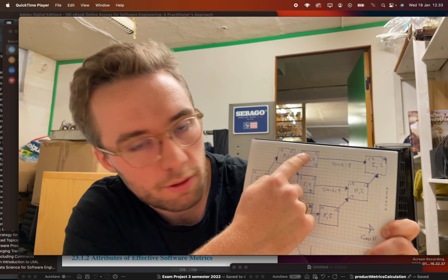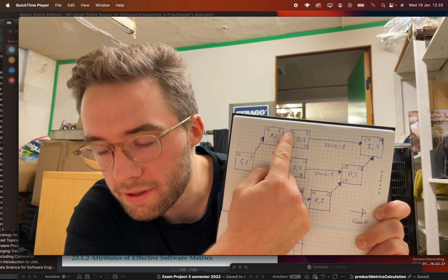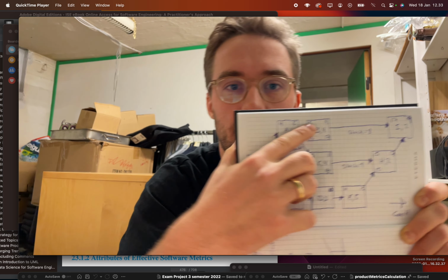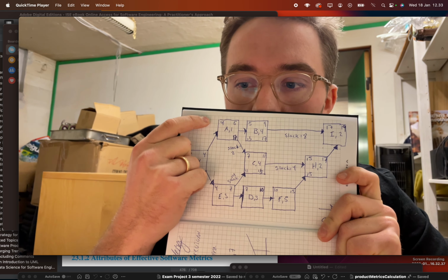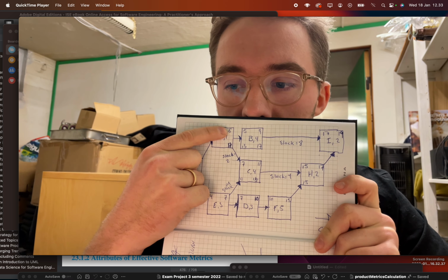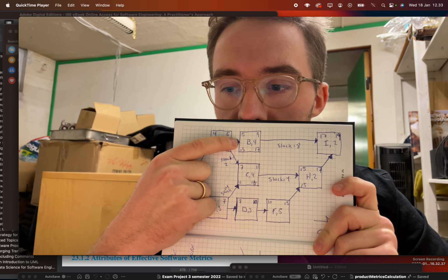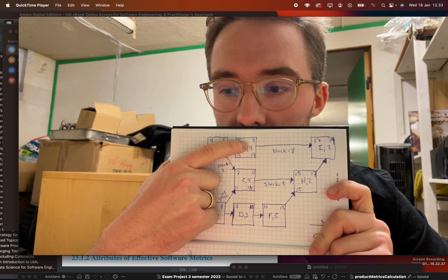And in this way it continues. So we add the hours here so that you can see. 1 plus 4 is 5, and then continue on at 5, and then 4 plus 5 is 9.